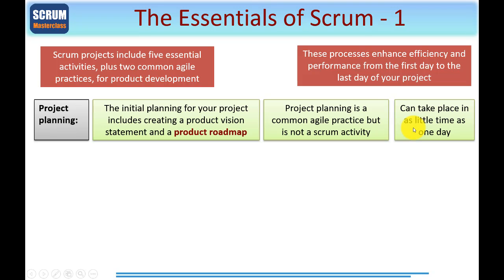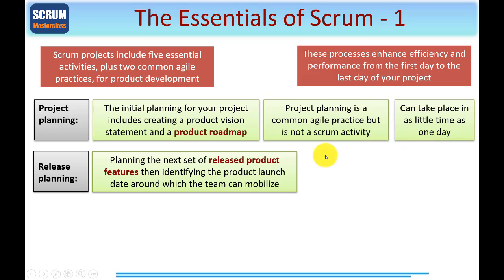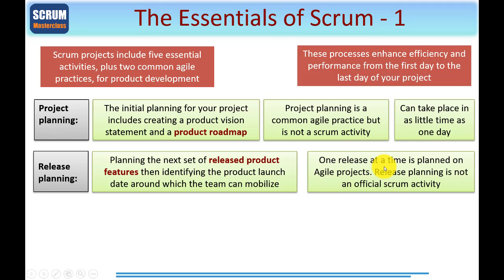Project planning can take place in as little time as just one day — perhaps a one-day workshop would get the job done. When we talk about project planning in a PRINCE2 context, you'll automatically think of documents and Gantt charts. Scrum does something a little different, but we can in fact connect them together. Next up, release planning — this is where you plan the next set of released product features and identify the product launch date. One release at a time is planned on Agile projects. Release planning is not an official Scrum activity, but what we'll be using is Extended Scrum, which includes this activity and allows it to dovetail nicely into PRINCE2.